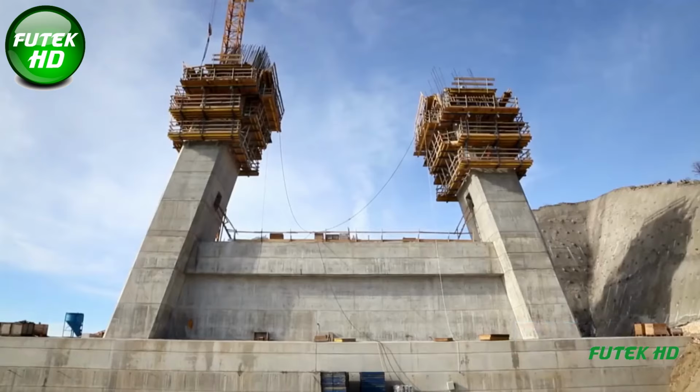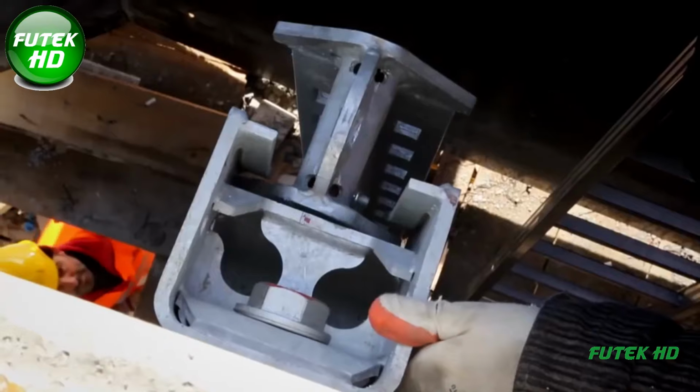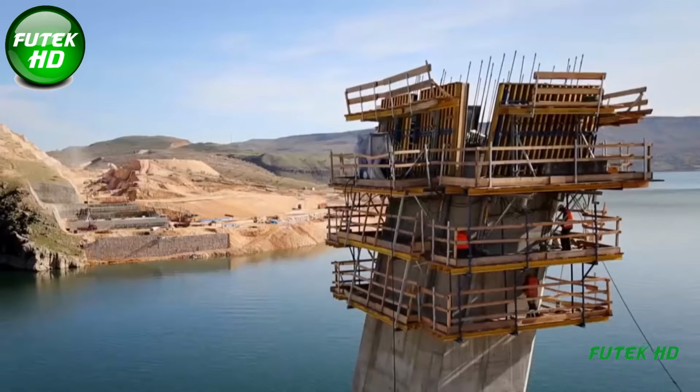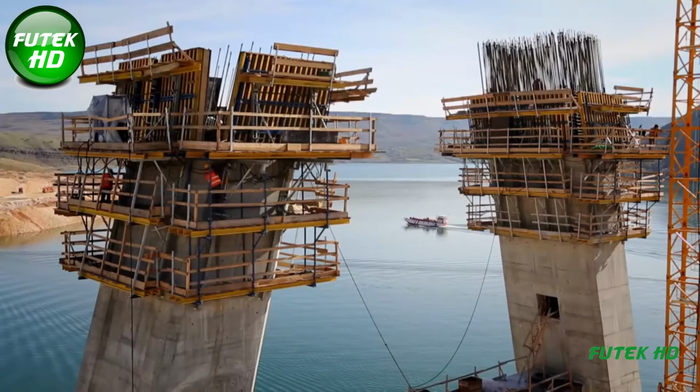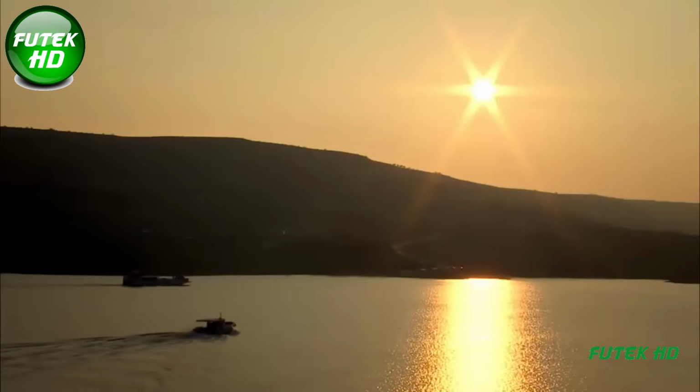In 2012, Gulson Holding, which had secured the contract, commenced construction. The project began with a major excavation phase involving the removal of over 150,000 cubic meters of rock and limestone to lay the foundational support for two 96-meter-tall pylons on either side of the bridge.